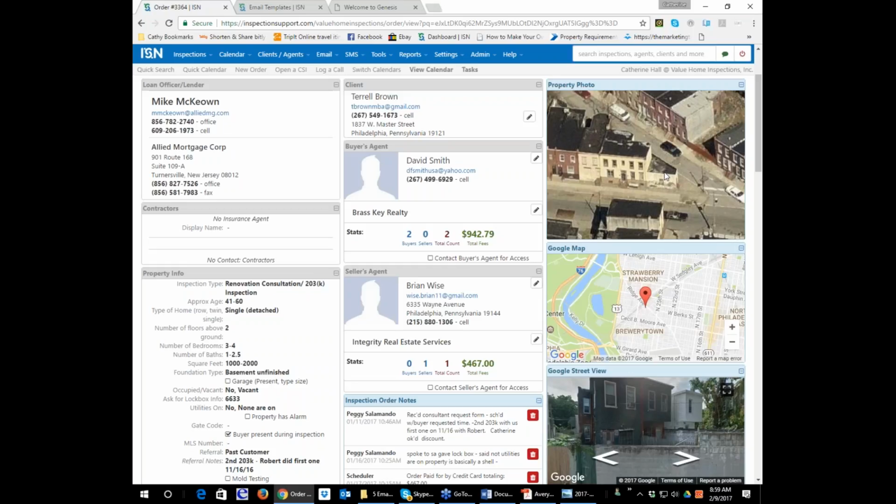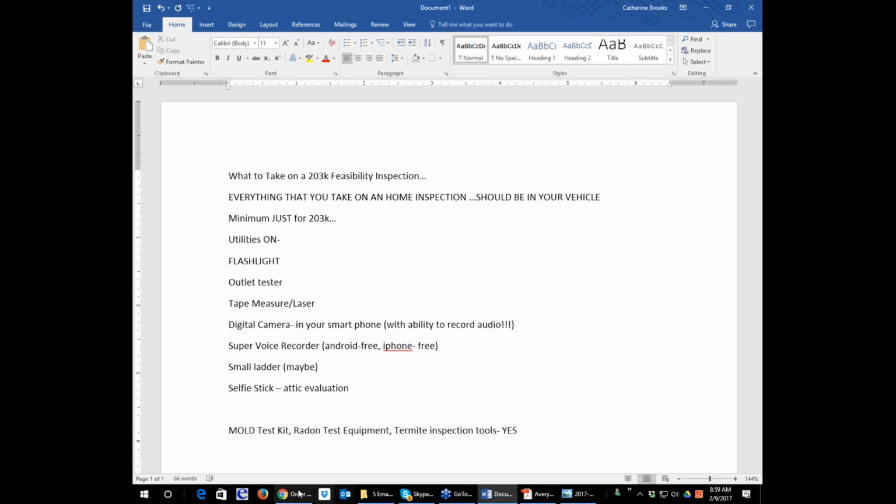Besides, with the furnace, that's more maintenance, more upkeep on the part of the owner. I can just cut out a window and stick one of my Lennox units high up in the ceiling right there in that wall. It's going to provide HVAC, heat and cooling, and tap into the meter for that apartment. It's going to cost me less money to put in, and less money to maintain and operate.